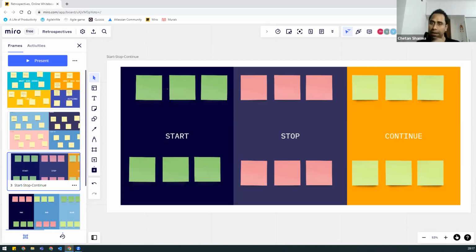Suppose I'm a developer. I finish in my local machine. Okay. Now I have to follow the process. I finish the change. I will deploy that in the main branch, then in a lower environment, let's suppose the dev environment. Then QA will do the test. Then QA will identify the bugs. I will fix that bug. Then it will go into the staging environment. Then it will go into the acceptance environment. At the acceptance environment, our product owners are reviewing those stories, and then they will give the feedback.